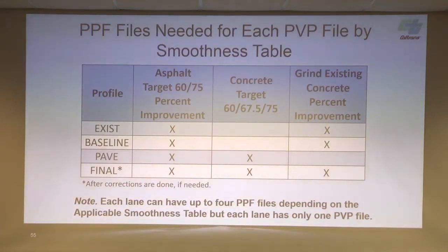Ideally, they'll give us a thumb drive with these PPF files on it out of the truck. Because the spec says, within 12 hours of the same day, give us these files. We don't want them taking off and then forgetting to give us the files or modifying the files. We have a time frame on how soon they have to submit these. They're supposed to give these directly to the engineer, these pavement profiles. So I don't know if that answered your question.